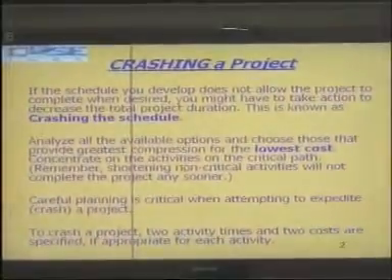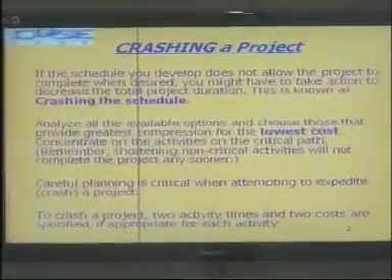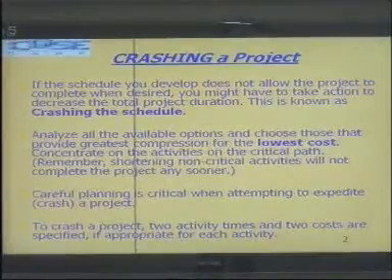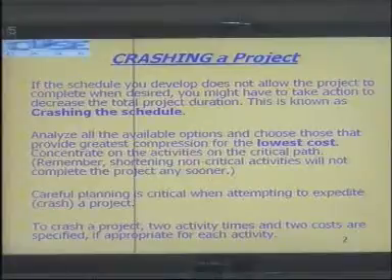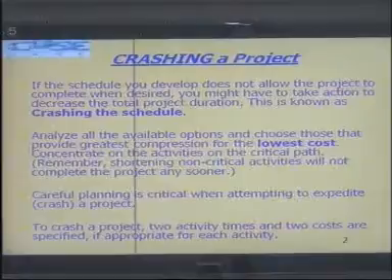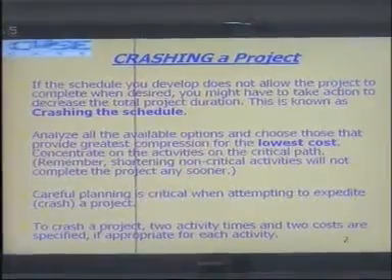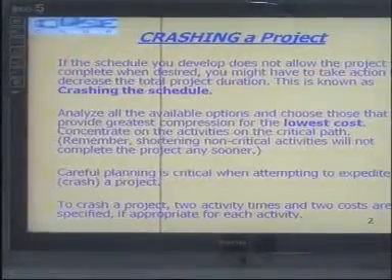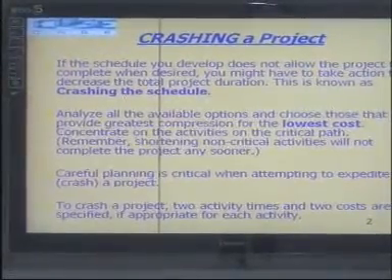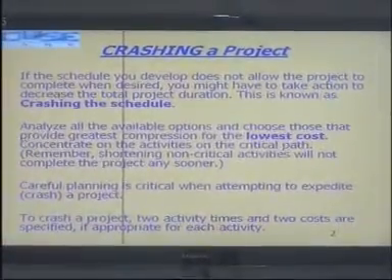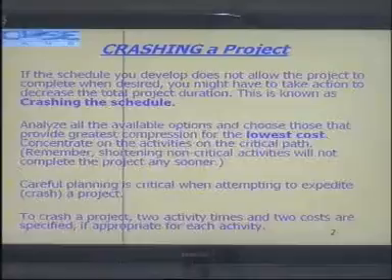If the schedule you develop does not allow the project to complete when desired, you might have to take action to decrease the total project duration. This is known as crashing the schedule. Analyze all the available options and choose those that provide greatest compression for the lowest cost. That means you decrease the duration or the schedule or completion time of the project at the minimal cost. Okay, why is it minimal cost?